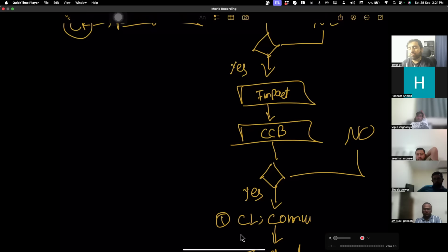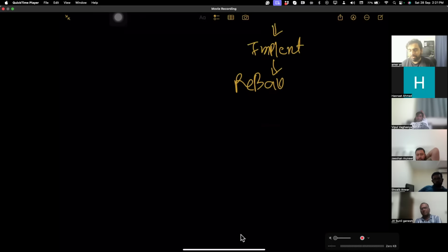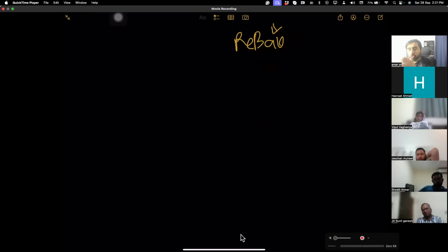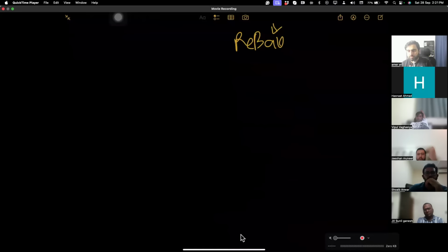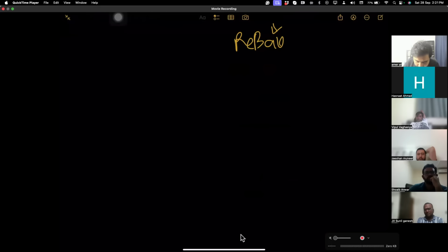Okay, this is how we handle change in predictive or hybrid. In agile, all changes go to the product owner. All changes, he puts them into the product backlog. He discusses with the client, grooms the product backlog, and then all the changes are handled that way.